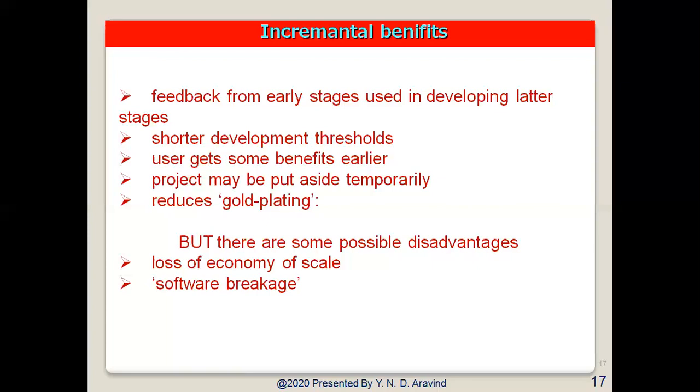Let us see the benefits of the incremental model. Potential exists for exploiting knowledge gained in early increments as later increments are developed, since we get feedback from the early stages used in developing the later stages. Moderate control is maintained over the life of the project through the use of written documents and formal reviewing and approval by the user and the information technology management, which designates the major milestones.